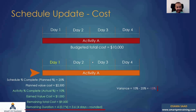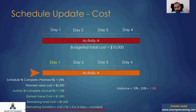Sometimes for some activities, you'll look at the remaining duration and nothing seems to change, although you entered a percentage complete. That's because the percentage is not high enough to convert the remaining duration into a number that changes when rounded. If you have 20%, maybe you'll have 3.4, which rounds to 3 — not 4. But 10% is not high enough to cause that visible change.